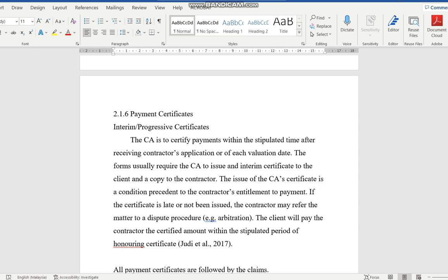A lot of this actually happens maybe in government contract contingency sum. Let's say you do rural water supply, and then you do kampong ABCD, this is the contract sum. But you put a contingency sum in case some YB comes to you or some people come to you and say that there's a land issue, or can you bring water to my kampong also, which is only a few 100 meters down the road. So okay, if you want to use that contingency sum to do the extra work, you can, you see. So yeah, that is what we call emergency money, contingency money. So remember, retention and contingency are two different things. Make sure that you understand this. They're not the same thing.